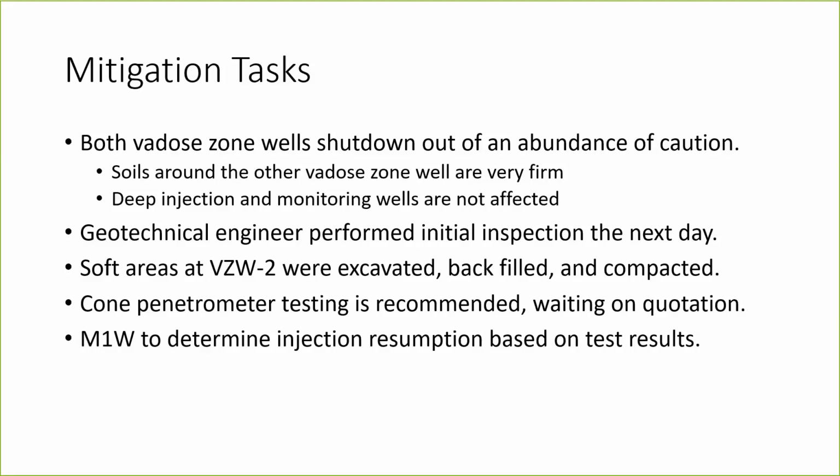We've got a quote in place with the geotechnical engineer to perform cone penetrometer testing. We received the quotation, the contract's been set up, and I just talked with the geotech firm this morning. They've issued a request to their sub, and they're waiting to hear back on timing for them to come out and determine the stability of the soils down to 100 feet.